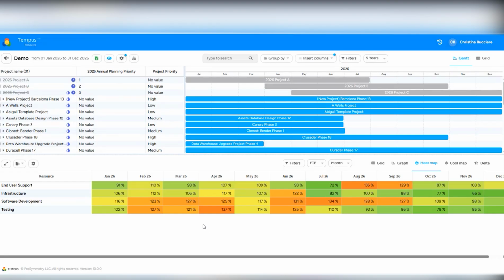It's also important in the build of this model that I choose to include proposal projects so that I do get these proposal projects loaded in already and automatically excluded from the current landscape. I also want to make sure I include partial projects, which would include all of the other in-flight work that maybe doesn't neatly fit into the timeline that I've chosen to model because I want to be future forward looking for 2026. We can already see the teams at the bottom. Again, I'm aggregating by that team attribute. And we already see that there is some strain on these resource teams throughout the year.